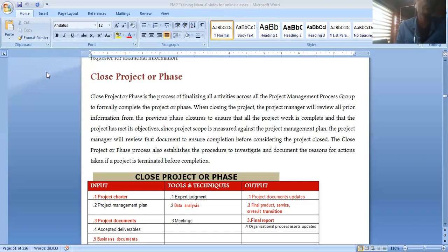Yeah, you placed it there because of management purposes, but maybe looking at how various activities are similar and within the boundary. You want to say, okay, for this milestone, since we're going to be using similar resources, let's focus here and ensure that we get this done before we move on to certain other areas. So we don't tie milestones to time. It's about activities. You can call time out of it, but it's not specifically about time. It's about work, right? Okay.